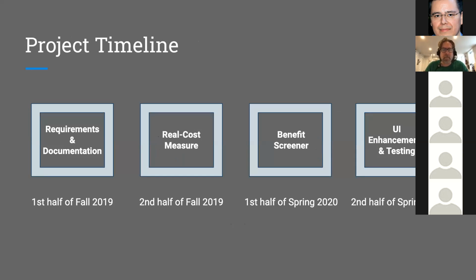Also, throughout the semester, we followed a strict roadmap to ensure that the product and the deliverables stay on track, and we still have enough time at the end of the last semester for testing purposes. So what we did was divide the 2 semesters allotted to us into 4 equal phases.